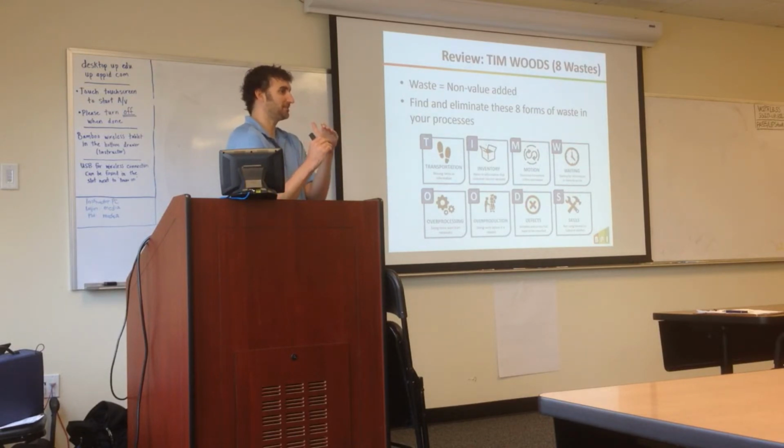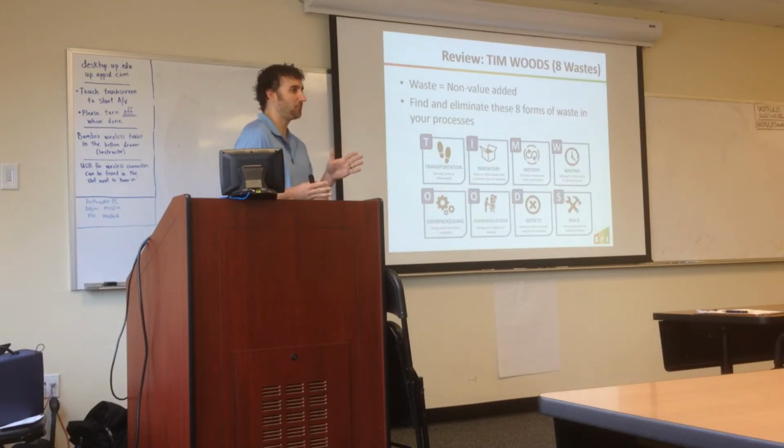And I'm going to stay focused and make sure those get done and prod on those instead of being passive and waiting for them to respond. I'm going to loop back and say, I've hit my maximum. I'm not going to have more than 5 of these cases going on at once. And I'm going to loop back to number 1 and just hammer away till I free one up. And then I can bring in a new case when I get that one completed. I'll bring in another one and keep managing the other 4 or 5.